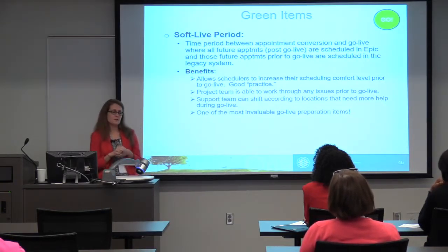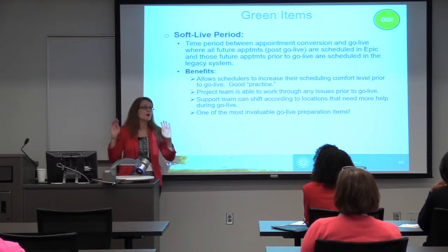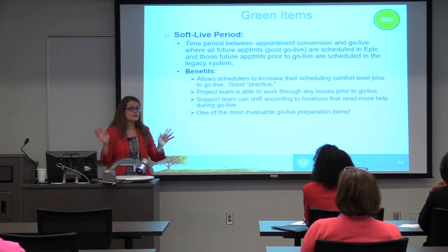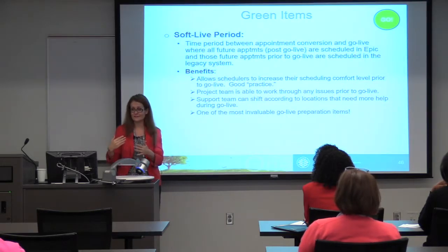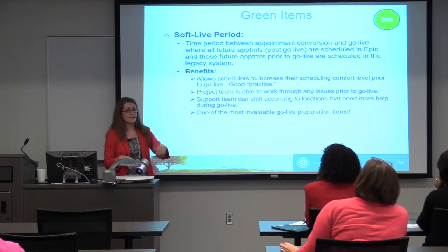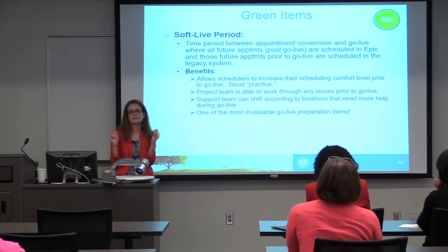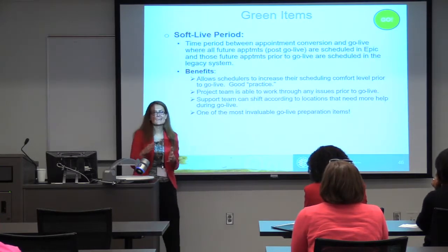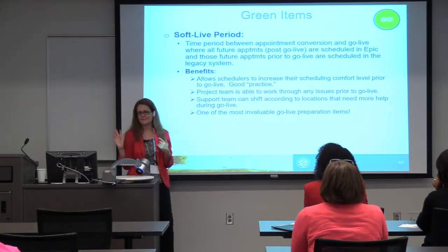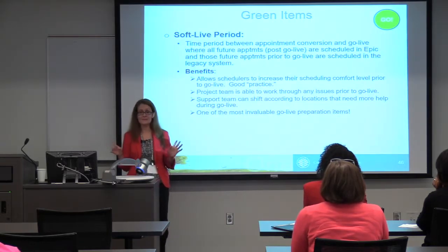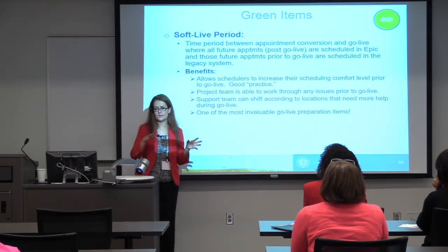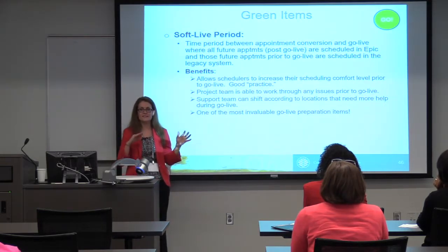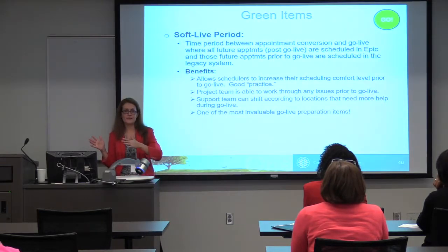During this soft live period, we may be at Rock Hill MOB and it's like, holy moly, the roof's flying off here. We need to send more people here, and we can adjust our support schedule. We may be at Steel Creek OBGYN. I made that up because I can't think of one off the top of my head. We may be there and it's like, oh man, these folks, they've got it. We don't need to come back here any more days. We don't even need to come back here at true Go Live. They're good. So during this soft live period, we're able to feel out our end users a little bit so that we can shift our support into an area that really needs it and come off of these folks that are good and they've got it.